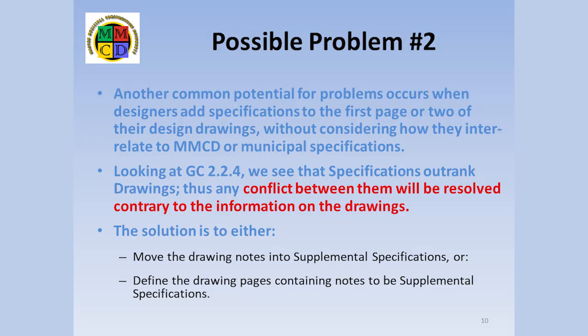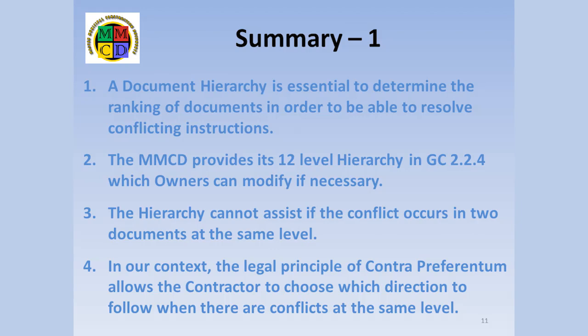There are two ways to avoid this problem. One: move all specifications on the drawings into proper supplementary specifications. Or two: define the exact pages of the drawings, including the drawing number and revision date, which contain the specifications, to be supplementary specifications and not drawings. Either solution will avoid the designer's specifications being outranked if a conflict exists.